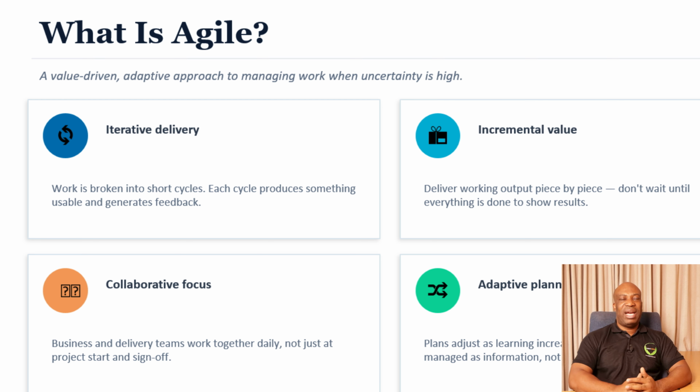That's the main difference between the iterative Agile approach and the incremental one. Say, for example, I'm going to give you an example for a software product. You have an accounting package you are creating as a product, and you only have, say, accounts receivable. You don't have an accounts payable module. So you first deploy the accounts receivable module, whilst the accounts payable module is being created.